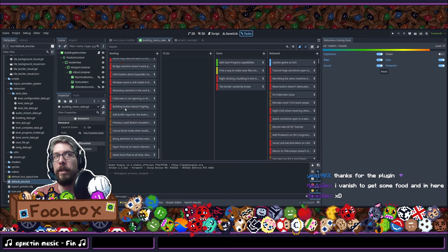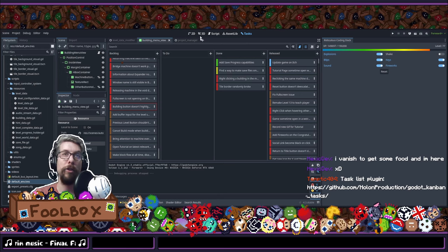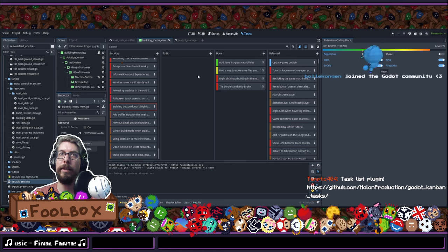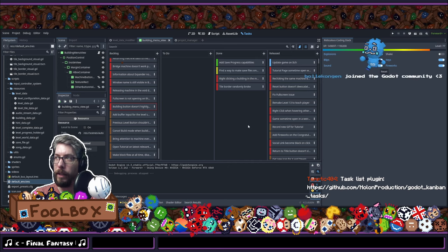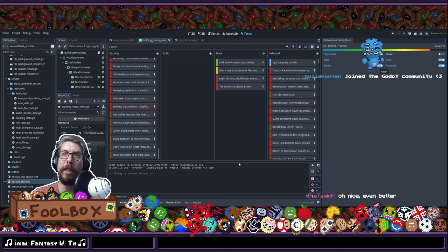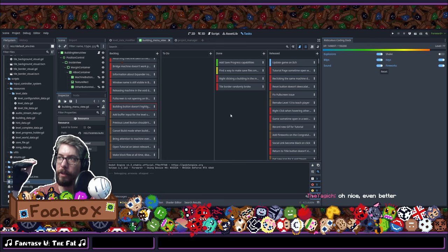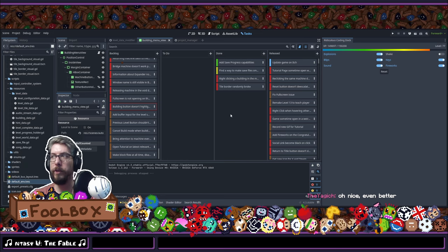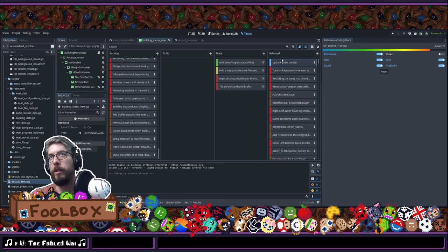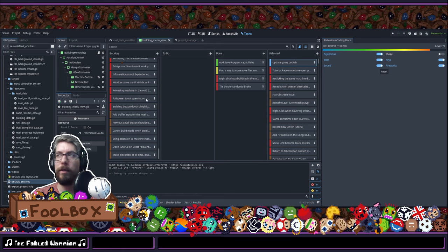For me, it's easy because I can take anything that's in the backlog, put it in to-do for a sprint or something similar to a sprint. And then I can move it to done. And then when I work on my changelog, when I push for a new update, I make sure that I go through all of this, write what is relevant, and then I can move all of that to released, and then I'm happy. I could even just delete them eventually, but for now, I'm happy with this.